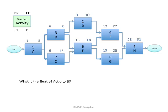The next question: what is the float of activity B? First, let's ask what does the word float really mean. For me, float means flexibility. When we think of the critical path method, float is the difference between the late numbers and the early numbers. Therefore, to calculate float, we need to do a backward pass, at least as far as activity B.